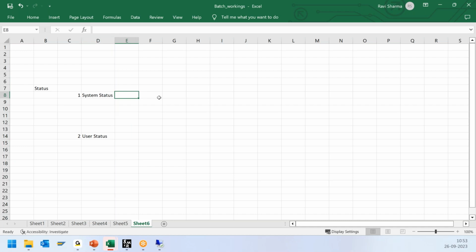So this system status can be different for each of the objects. For example, in case of AR, it can be different. There are a few system statuses which are common, for example, created, close. Those are the common system statuses. But apart from that, there are a lot of system statuses which can differ from object to object. By object here, it can be different for the WBS element, it can be different for the network activities, it can be different for the plant maintenance order, like that. But there are many system statuses which are already configured by SAP.